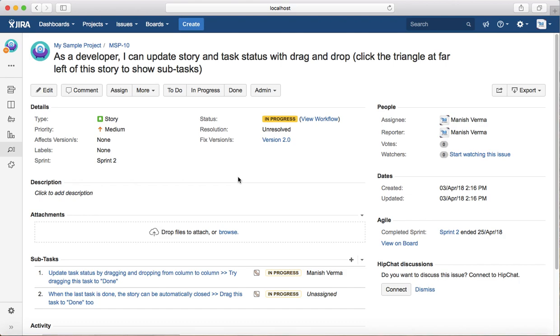So the advantage of having these subtasks within the story is that you can track the progress of the overall story. First thing is you can track what's the amount of work within that story, and if it is too big then you need to divide it into two different stories so that it's small enough to fit into the sprint, that is a 2 to 4 week cycle.